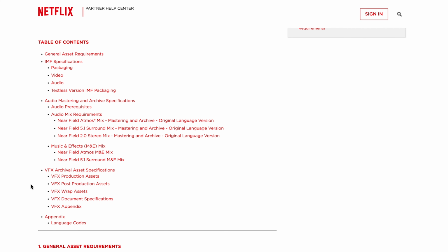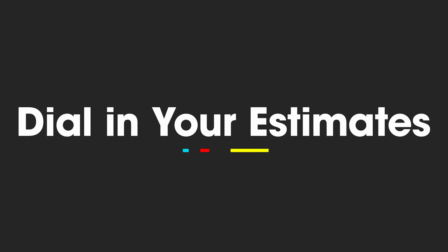So you've broken down the script, you've met the above the line folks, so by now you can at least make an educated guess for your budget cap if the line producer didn't provide it to you. Pick a number and then aim for 15% below that as your North Star. Do research, ask other post people, start laying in numbers based on market rates. Once you've got numbers in for everything, you'll already see you've got to start playing with it and moving things around to keep your totals in line with your budget cap.